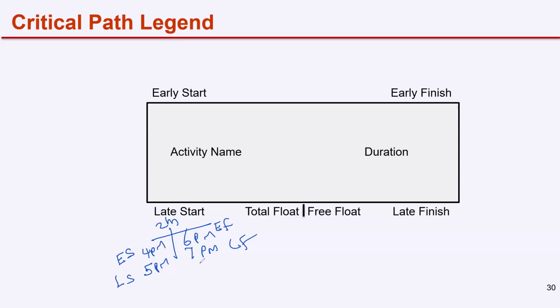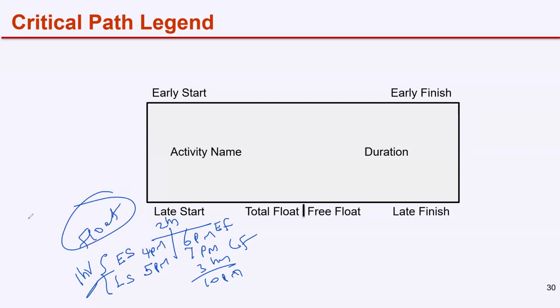Now assume this seminar will go for 3 hours and it will finish at 10 p.m., followed by a good dinner, but that's not the focus of our discussion. For a 3 hour seminar, you have a flexibility of an hour to work with, right? Between 4 and 5, anytime you can start, and accordingly you'll reach the location. So this flexibility is known as float. We'll talk about total float, free float, etc.